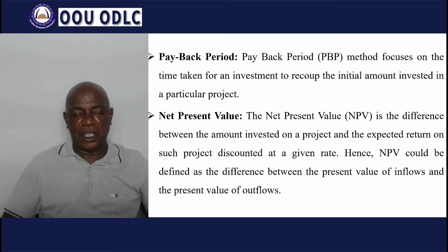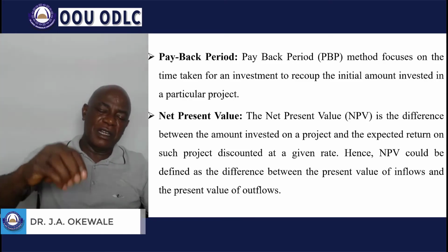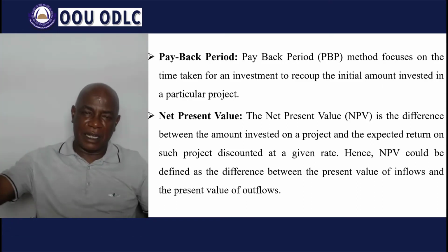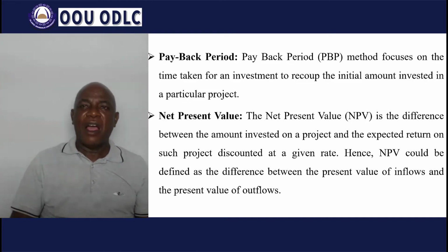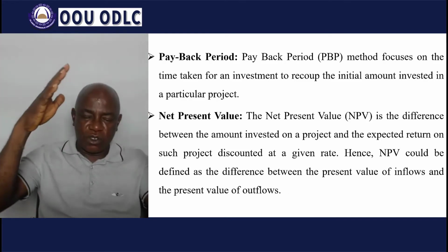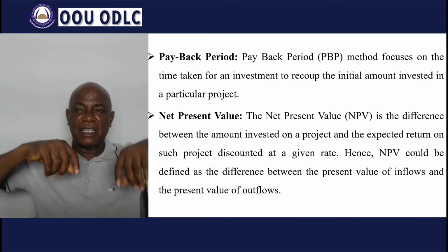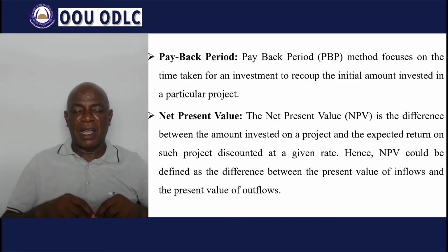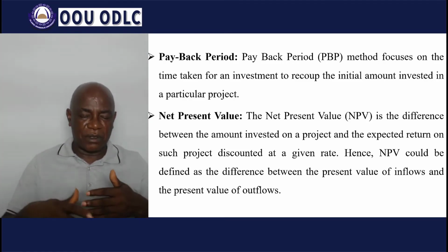If you put up a residential building for rent, for example, you ended up spending about 15 million in constructing the bungalow. The question I want you to ask yourself: if I put 15 million naira down and the bungalow is erected, and the source of revenue, the return, will be the rent you collect on it, how much rent will you need to receive from that facility to take care of the total amount you have invested? So that time period it takes to recoup the amount you have invested in the project is what we call the payback period. Aside from that, of course, it is a measure in terms of years.